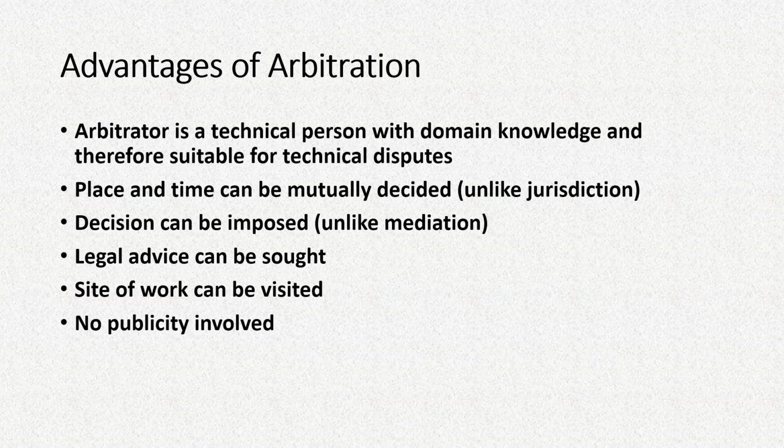Also, finally, no publicity is involved generally in case of arbitration. In a court case, the court will send public notices, and if it's a high-profile case, there will be news items based on that. But if it's an arbitration process, it can be private, only between the stakeholders such as client, contractor, investors and so on. Therefore no publicity is involved, and lots of hassles and expenses are spared.